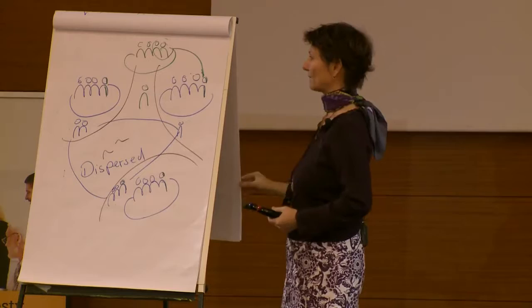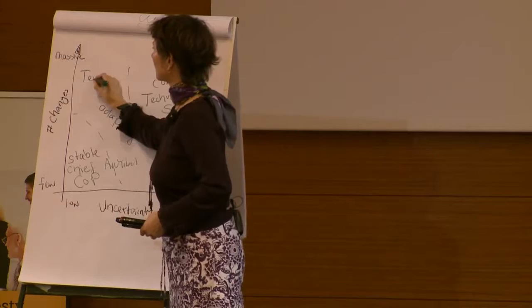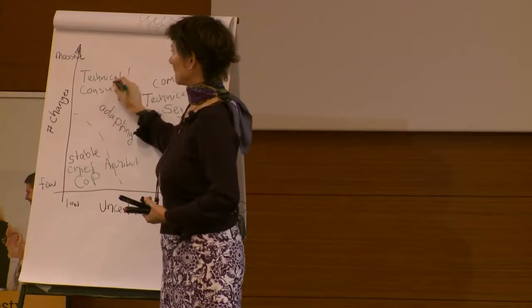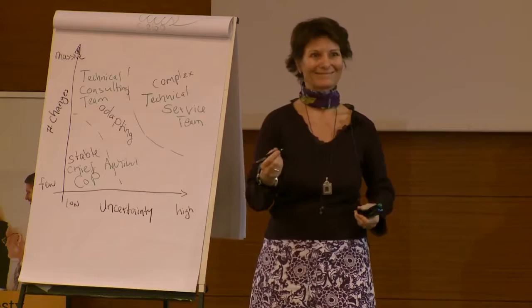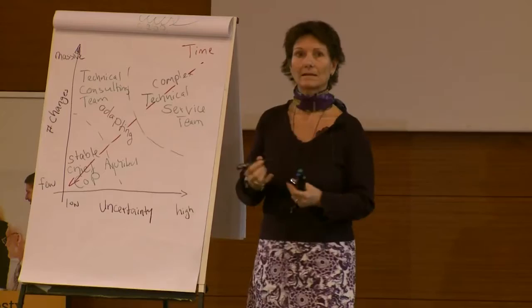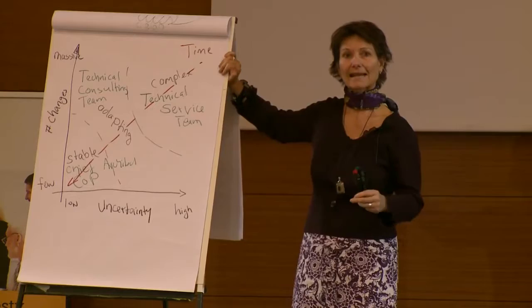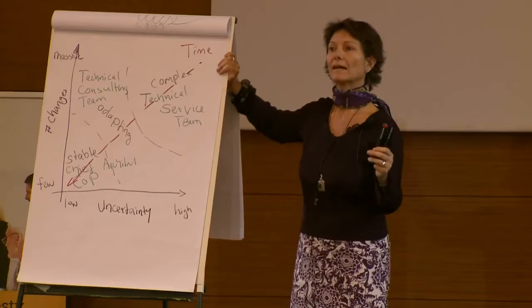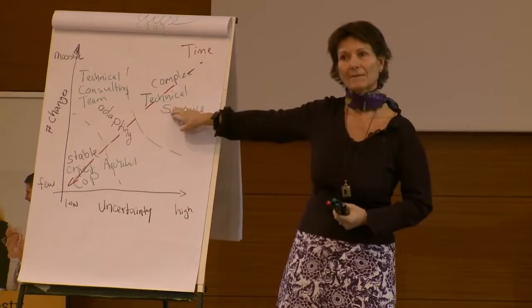And this is here. And now I said specific amount of time, which most often means, and now making this picture even less readable, maybe, that a typical time frame is this. If we are starting on a new product, maybe we are very uncertain. We don't really know what's going on here. Maybe we really need a lot of support from the technical side, and therefore we start with a separate team focusing on that, ensuring that everyone else can focus on the business value and that we can use that for all the other teams. And after a while, things are getting more and more stable, so we are more in an adaptive area.